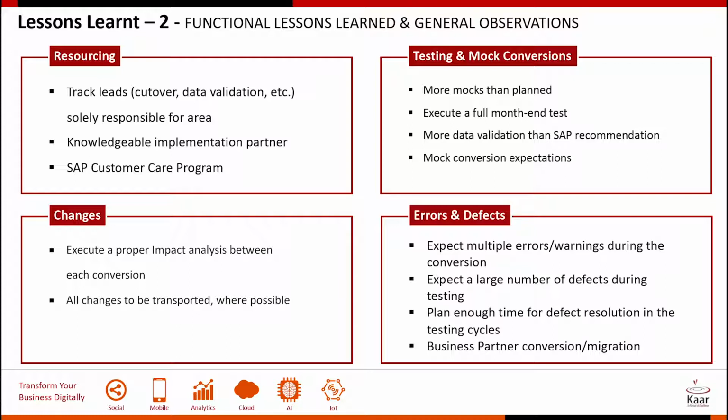And changes, whatever change you make in your development, pre-conversion or post-conversion, ensure that you capture them in transports, because when you're doing your production conversion, bringing them in as transport is the right thing to do.